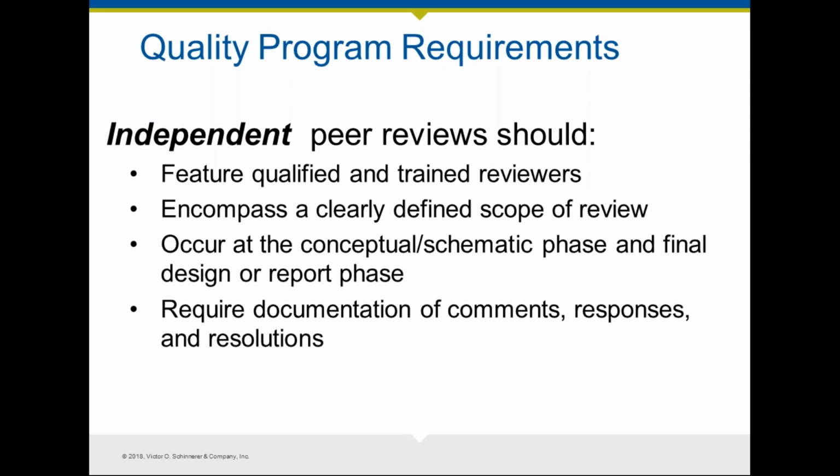For it to be most meaningful, it should be done both at the conceptual schematic phase and the final design or report phase, so that there's clear evidence that this was looked at a time when meaningful feedback could have been incorporated from your peers, and that this final solution is also reviewed.